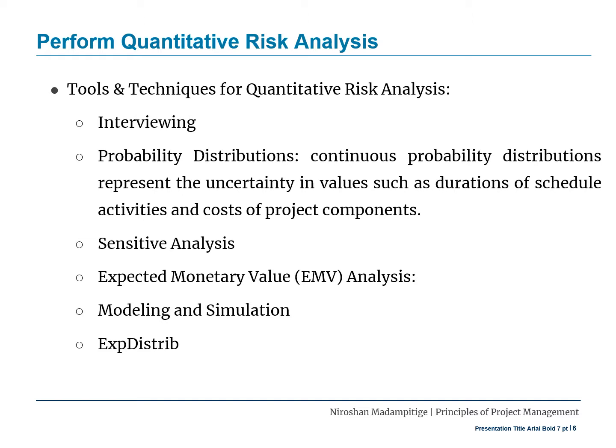Now let's have a look at some of the tools and techniques for quantitative risk analysis. As we discussed earlier, interviewing is one technique. Probability distributions is a way of looking at the continuous probability distributions representing the uncertain values such as duration of scheduled activities and cost of project components.